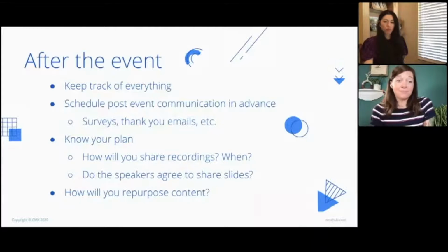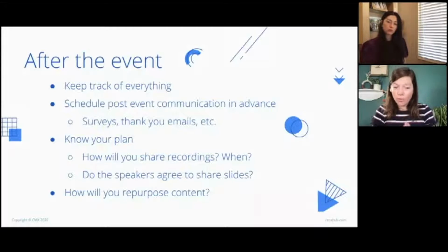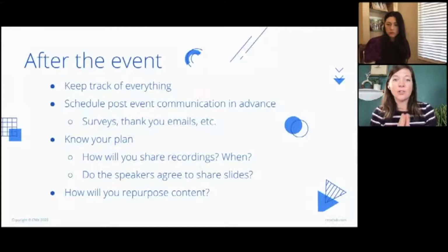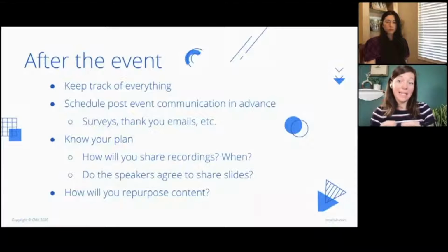And know your plan. Will you share recordings? How will you share recordings? Do the speakers share their slides? How will that happen? In our case, we know that recordings are important. Our community loves recordings, so that was a must-have when we were deciding our platform. We knew Hoppin allowed recordings and automatically recorded each session, but we didn't ask any more detail than that. It turns out that at this time, the platform records videos in 8 to 12-minute intervals, and the files are all separate.